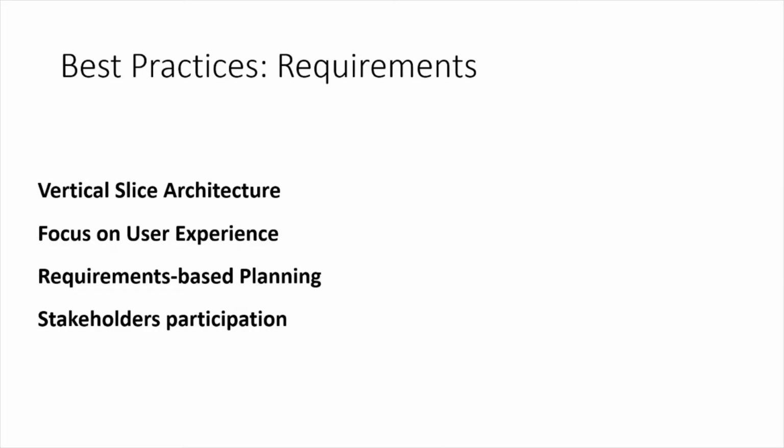So the best practice for any BI and data analytics project would be to use vertical slicing, which means that the team should work on the complete full stack functionality. So some stuff developed on the back end, then you get your front end connected, and after that you have something, right? So you have something to deliver to the customers by the end of the sprint.